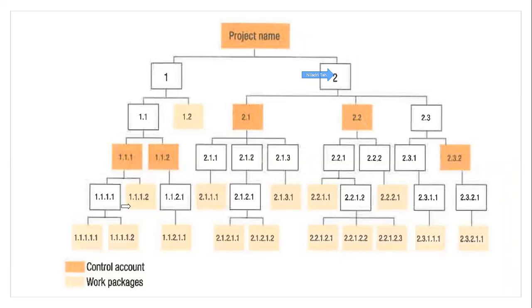Now you may ask me, what is a control account? A control account is nothing but the finance piece. It can have many other things, but a control account is a kind of identifier for that particular work package. So let's say I have the overall budget for the program, which is great, and I know I have to spend this much money for this big program. Now, I would like to know which of the verticals is spending what amount of money.